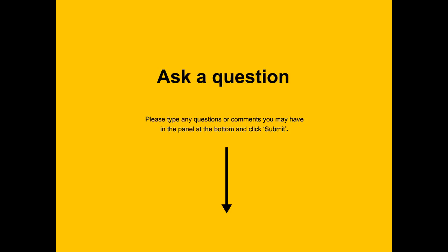So it can't trigger until there's a notice, and it can't trigger until the notification has been accompanied by the documents listed in clause 421.2. So in real terms, until the courts say otherwise, I don't think what we've drafted now amounts to a condition precedent.